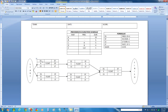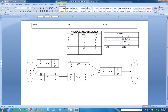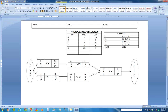The first thing to do on that very first activity — and if you only have one, this still applies — change your earliest start time to just 1. For this specific example, I have to change both of those to just 1. Now I need to calculate earliest finish time. The formula is: earliest finish time equals the earliest start time plus duration minus 1. For activity A, earliest finish time is 1 plus 10, which is 11, minus 1, which is 10. For B, duration is 5, plus earliest start time of 1, which is 6, minus 1, which is 5.